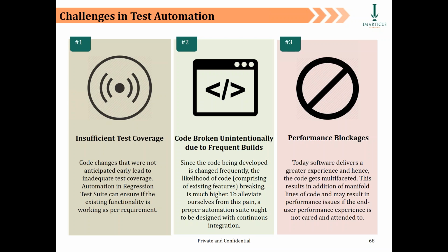So you have automation script for a particular business scenario, but then last week Ankita made a code change in that business process. So she wanted to make the process run faster. So she made a code change. That's fine. But did we create a script now based on the new code? If we didn't, then your earlier script may not run properly on that particular testing.